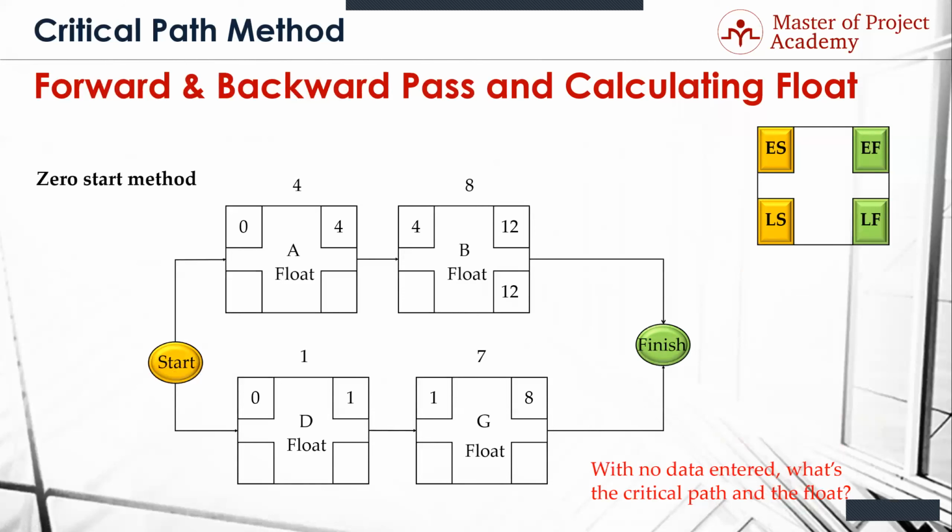So do we need to even do the math going backwards? No, we know that 4 is going to be the next number that goes there, and we know that 4 is going to go there, and 0 is going to go there. But if we want to do the math, it's 12 minus 8 is 4. Carry the 4 backwards. 4 minus 4 is 0. With me?